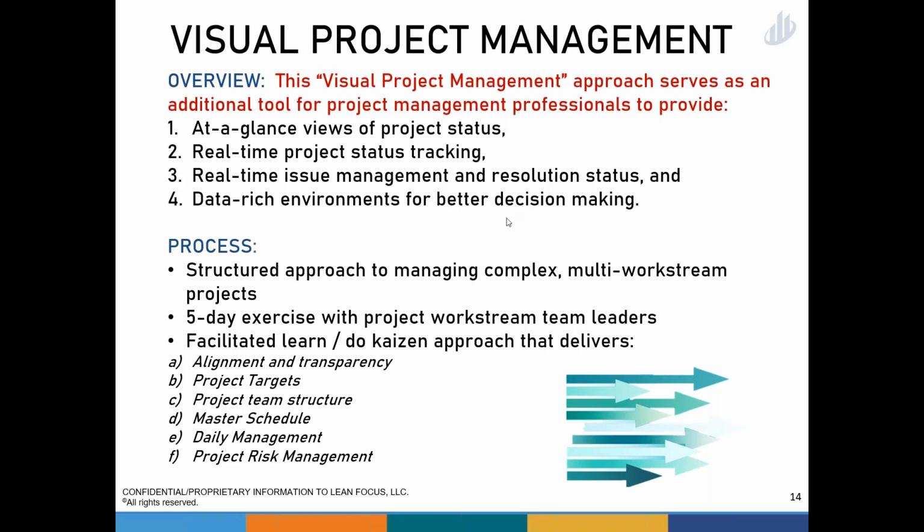So we always want to have our headlights on about 4 weeks out and looking at what's going well against what we said we're going to do. What do the key milestones look like? What help does the team need? What obstacles are they running into? So that we're consistently driving that forward in the context of the overall project plan and critical path. And so it's a daily management type approach where the key associates involved in executing that program are driving every day against that progress, escalating issues, and giving feedback on what's going well and what their challenges are.